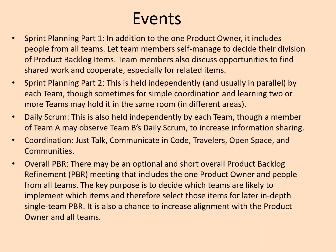In Sprint Planning Part One, in addition to the one product owner, it includes people from all teams. Team members self-manage to decide their division of product backlog items, and team members also discuss opportunities to find shared work and cooperate, especially for related items.